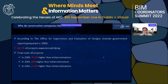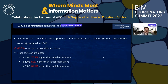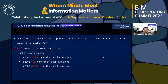In Iran, we have special circumstances. According to the Office for Supervision and Evaluation of Designs, Iranian government reports from 2006 found that 68.1 percent of projects experienced delays. Final project costs were 70.3 percent higher than initial estimations in 2000, 60 percent higher in 2001, and 67.6 percent higher in 2002. This is really mind-blowing.